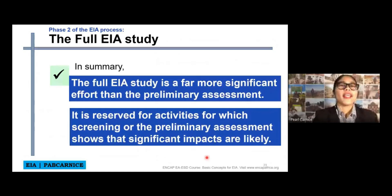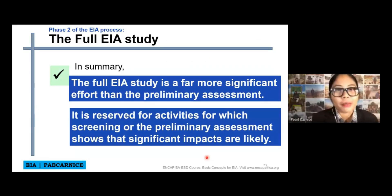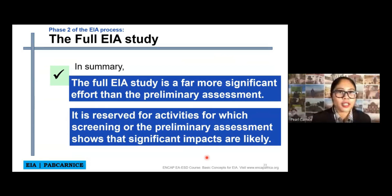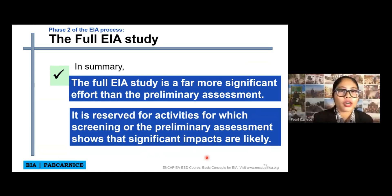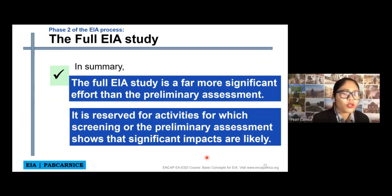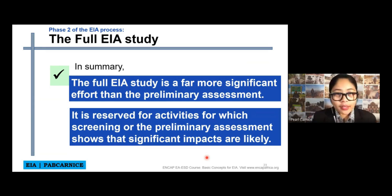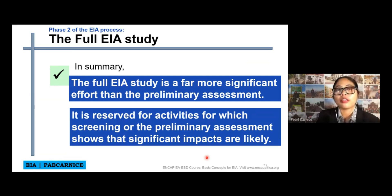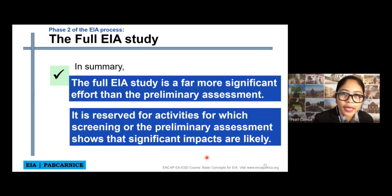So, in summary, the full EIA study is a far more significant effort than the preliminary assessment. The preliminary assessment, just from the word itself, is only preliminary. But the full EIA study is more detailed. It is reserved for activities for which screening or preliminary assessment shows that significant impacts are likely to happen. The purpose of the full EIA study is not to find impacts that will not be significant, but to allow an informed decision to be made about which significant environmental impacts may be acceptable to obtain a particular development objective.